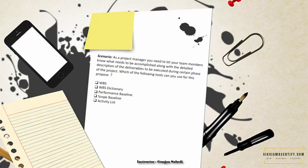The correct answer is WBS dictionary, as it contains the detailed description of work packages including schedule milestones, what is being delivered, how to know if the deliverable is accepted, resources, and expected cost. WBS alone is incorrect because it does not describe work packages in detail. Scope baseline or performance measurement baseline could also be correct since both contain the WBS dictionary. Activity list is incorrect as it only lists activities without detailed deliverable information.